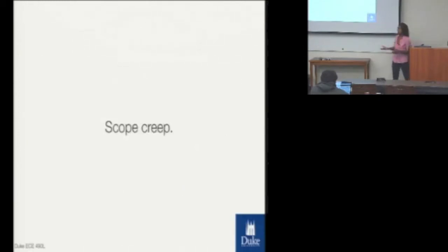So the other thing that we need to think about in terms of complexity is scope creep, right? We've talked about this quite a lot. So the one thing that happens when we have scope creep is we can decide to delay the project, right? Or we can decide, hey, we're not going to delay it, we're going to ship it, and we're going to leave this particular feature or this particular story out of it. Now, the key thing you have to think about is, is leaving that story or that feature out going to be a detriment to the customer?